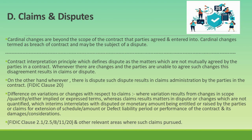Slide 5: Claims and Disputes. Cardinal changes are beyond the scope of the contract that parties agreed to and entered into. These changes are often termed as breaches of contract and may become the subject of disputes. Contract Interpretation Principles define a dispute as matters not mutually agreed upon by the parties in a contract. Whenever there are changes and the parties cannot agree, the disagreement results in claims or disputes. Wherever there is a dispute, it results in claims administration by the parties in the contract, as outlined in FIDIC Clause 20 — Claims, Disputes, and Arbitration.